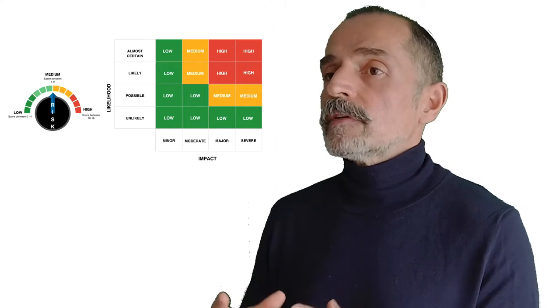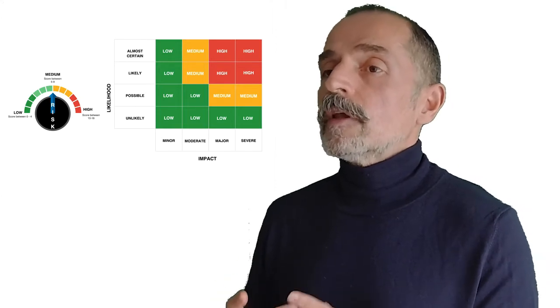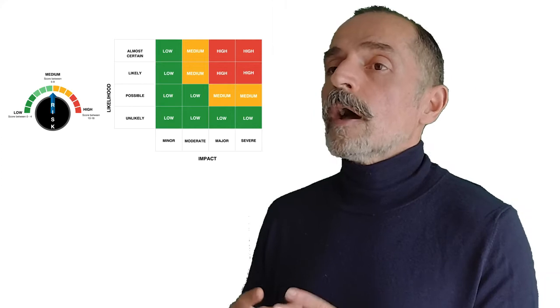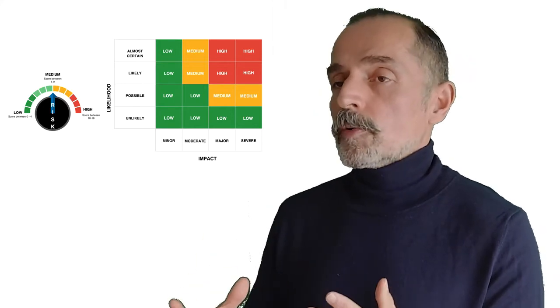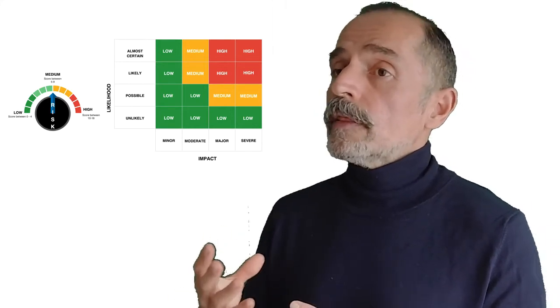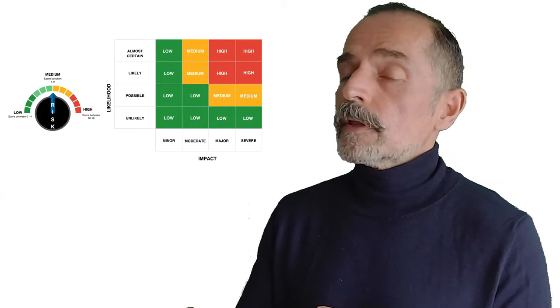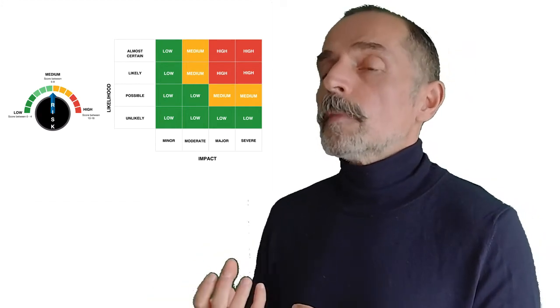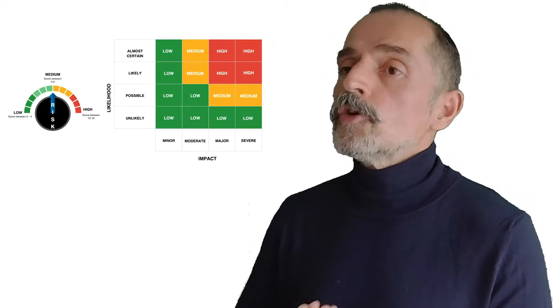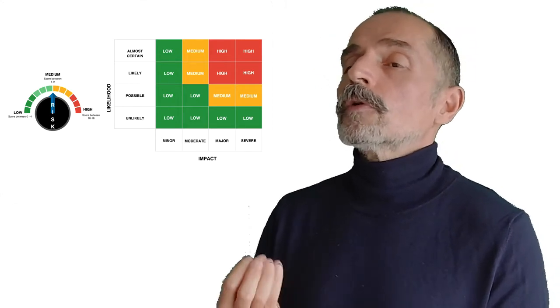Risk mitigation activities, in fact, give us information to design the amount of contingencies in our project in such a way that if the risk happens during implementation, you can use the amount in contingencies to add a new activity to your results chain.